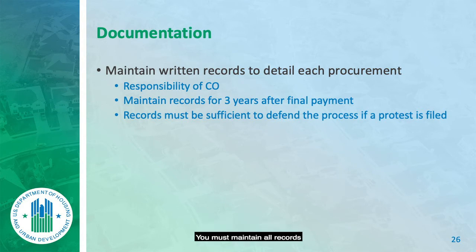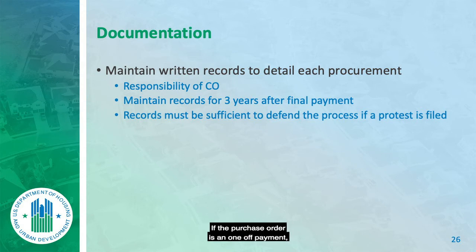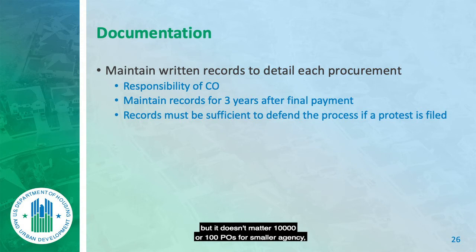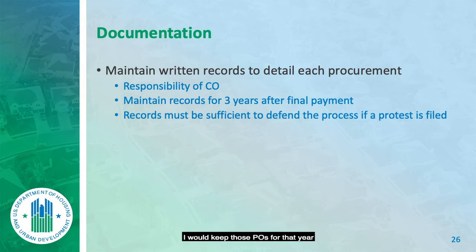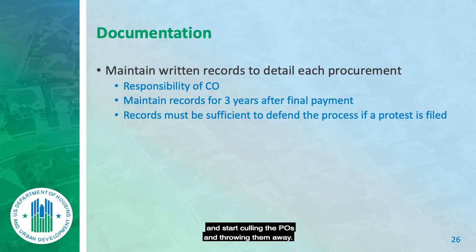You must maintain all records for three years after final payment. Purchase orders for a single one-off purchase should be kept for the year payment was made, then three more years in a file. After four or five years, you can go back and purge old POs. However, for bids and RFPs, keep them longer.